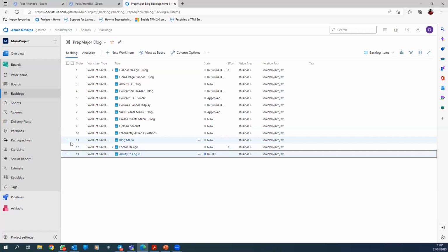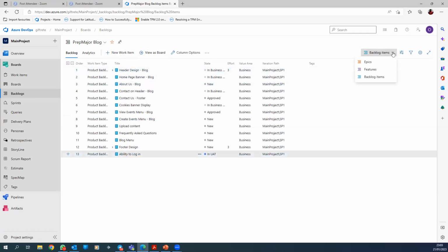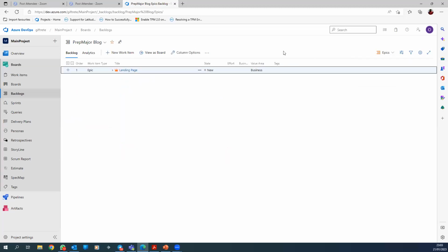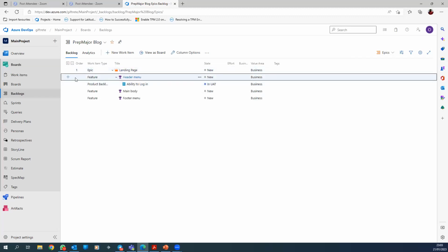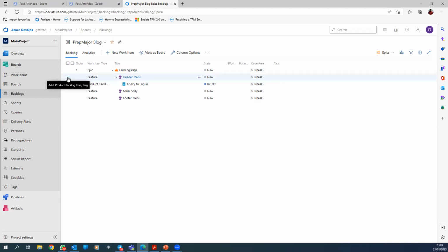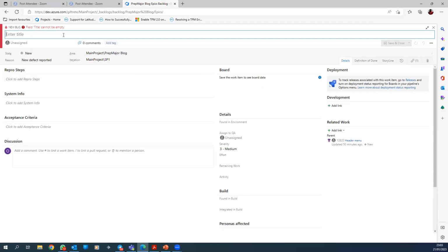I was just going to ask, as a BA, assuming you're doing the UAT and you realize that there's been an error or a bug, who would you report it to? Is it the tester? So what you would do is, do you remember I showed you the board? Remember when you come to feature and you hover on it, can you see what's happening here? Docked, backlog item and bug. So you can click on the bug and create a bug. You title it based on the work you were testing.